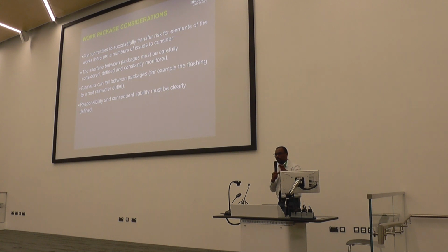But if you give all that electrical fittings supply and, let's say, first fix to one contractor, sometimes it's out of your control. If the manufacturer specifies that in order for the warranty to be valid, the subcontractor has to have a certain accreditation, and your first fix contractor can do the first element of works but doesn't have the accreditation, you have to sub it out to someone who does. So it's not always that simple to use just one contractor.